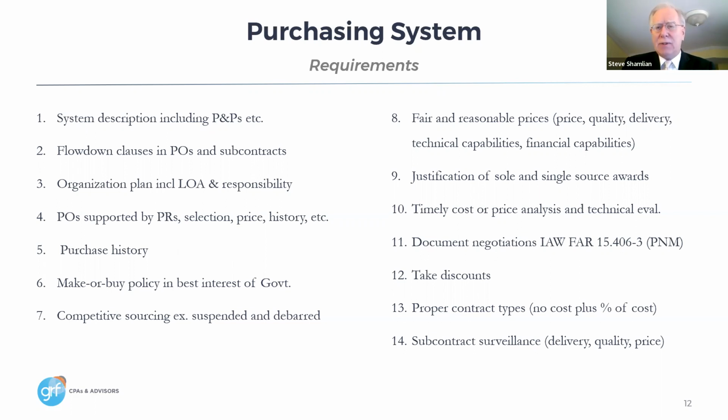And that is the basis for any subsequent defective pricing audit. It should show the cost or pricing data that was submitted in support of the vendor's price. It should show anything relating to the understood scope of the work.